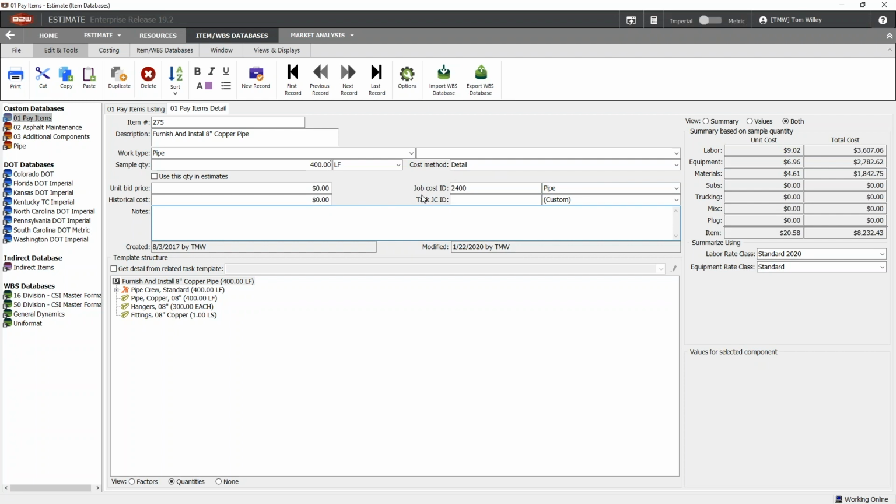But it's also important to understand that we can apply those codes at different levels. Different accounting systems have different levels of detail. So you could be applying this code at task level or even crew or cost component level. And that, again, empowers these templates to be much more useful, because that's that much more work you're not going to have to code in the item, in the estimate itself, or dropping the estimate out into Excel and manipulating it. So make those templates work for you. Put in the codes as well as all the other cost-saving maneuvers.